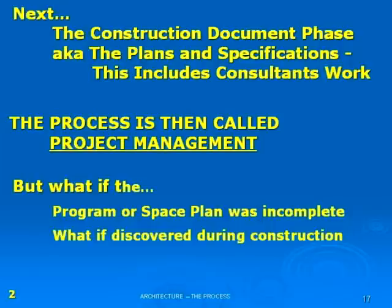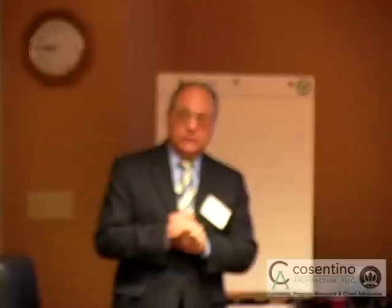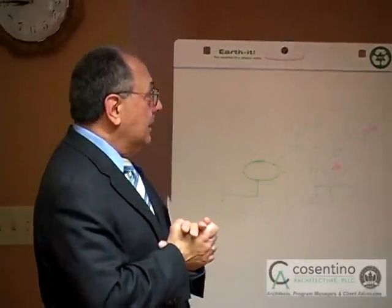But once it's out to bid and out to the contractors, it becomes very difficult and very expensive. Because now a contractor is looking at the set of plans you produced, and you're telling him, 'Wait a minute, Mr. Contractor, we want to make a change — we want to expand the building out another couple of feet this way.' These are, or can be, expensive changes. So if the space plan or program was inaccurate or incomplete, it needs to be corrected at this last stage: construction documents.